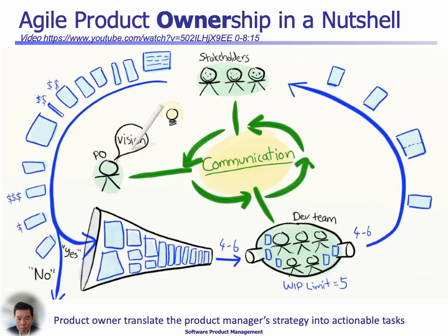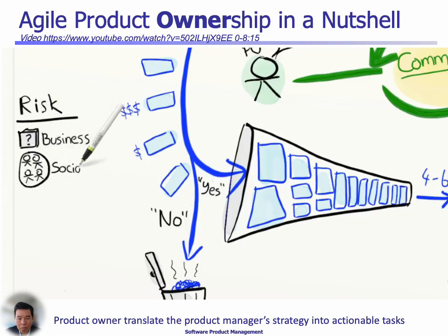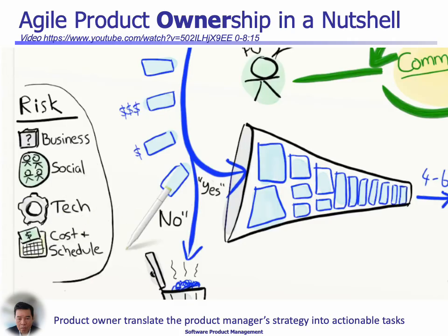Let's take a look at a few of the trade-offs that need to be made by Pat and the team. First of all, there's a trade-off between different types of value. Early on in a project, uncertainty and risk is our enemy. There's business risk. Are we building the right thing? There's social risk. Can these people build it? And there's technical risk. Will it work on the platform that we want to run it on? Will it scale? And there's cost and schedule risk. Can we finish the product in a reasonable amount of time for a reasonable amount of money? Knowledge can be...